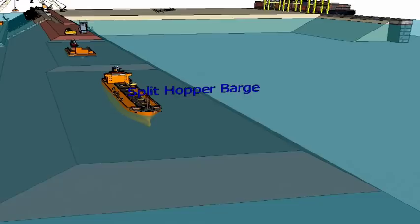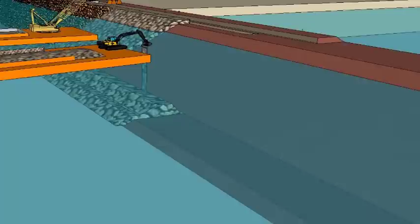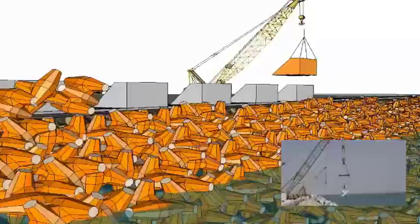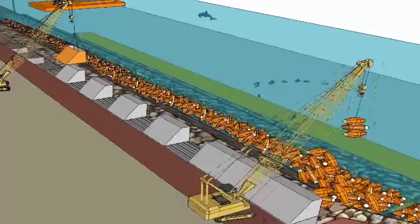The breakwater is constructed using core rock, rock armor, precast armor units and geotextile. The core rock is placed using split hopper barges in deep water and by lorry tipping and dozers in shallow water where the risk of slippage is minimal. The precast armor units are placed using crawler cranes fitted with a real-time visual aid system that enabled 70 placements per day. The wave wall is cast in situ in 6-meter long sections.